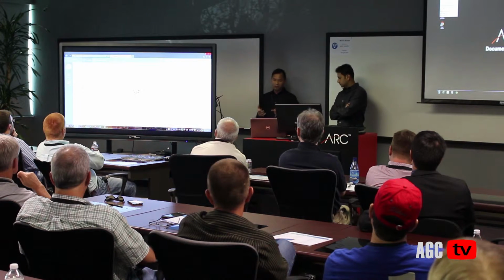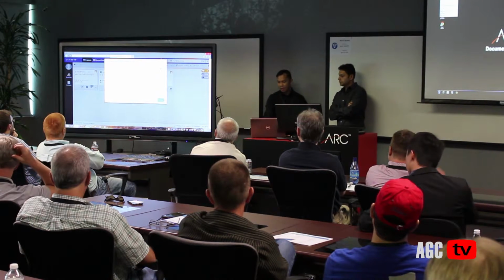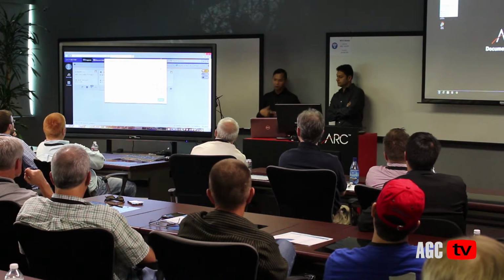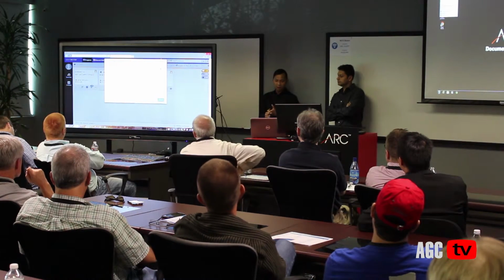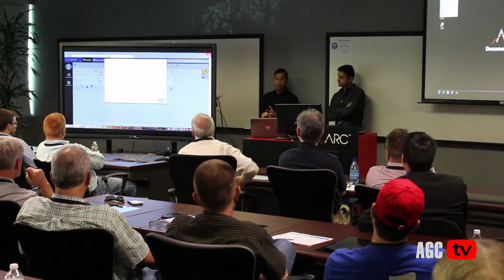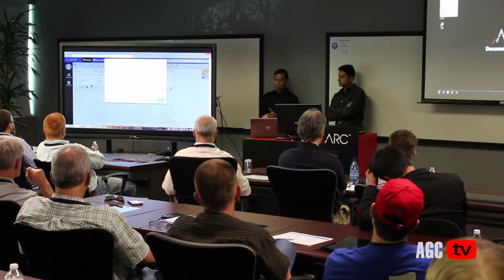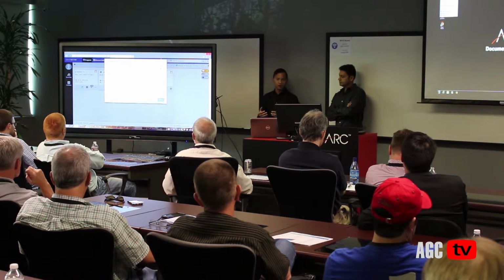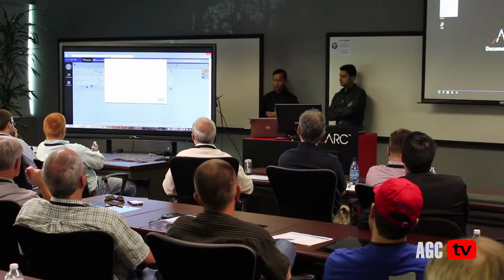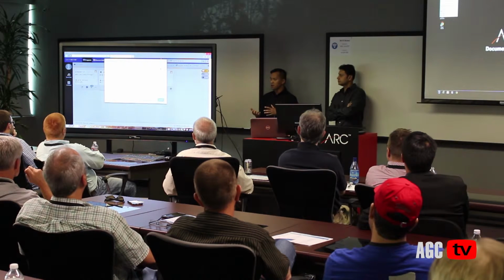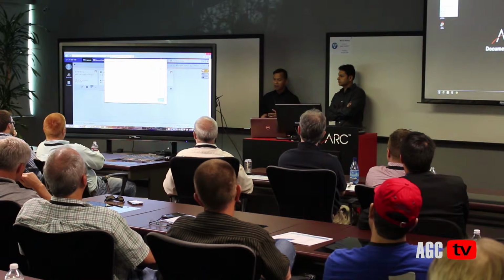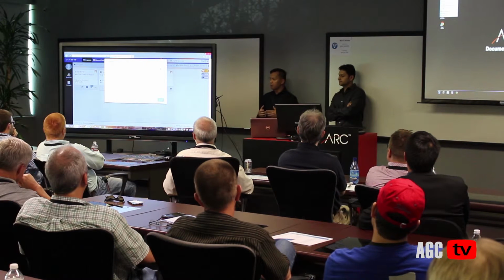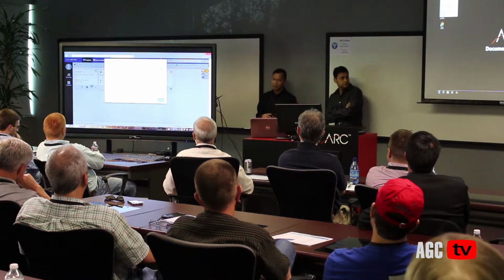I can invite them as a viewer, or I can allow them to upload some documents into Skysite. For the viewer, they can download it using the desktop sync or using the tablet app, and it's free. They don't have to pay anything. They can just be a free viewer as long as they're just viewing. Once they have to upload anything, let's say you're a subcontractor who needs to upload submittal items, you need to give them edit and publish rights, and they will be able to upload to Skysite.